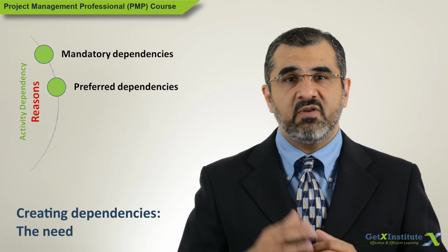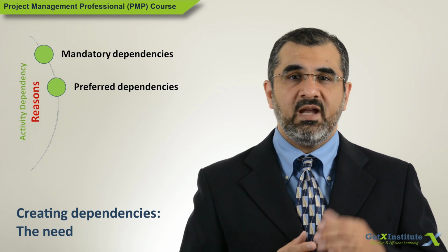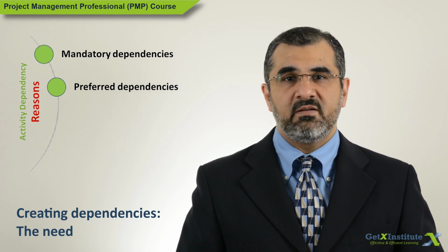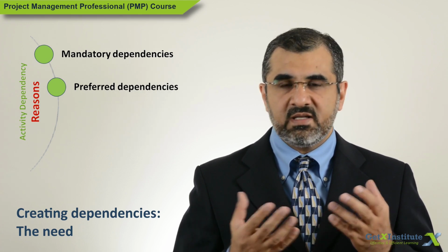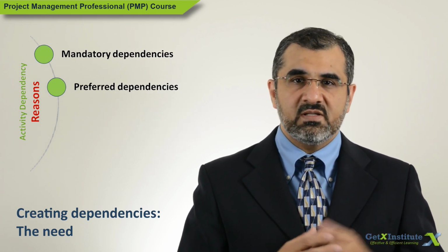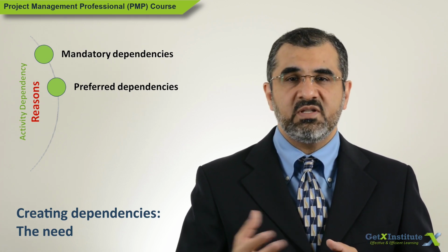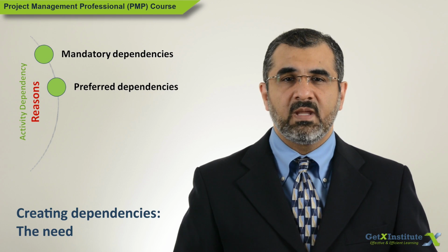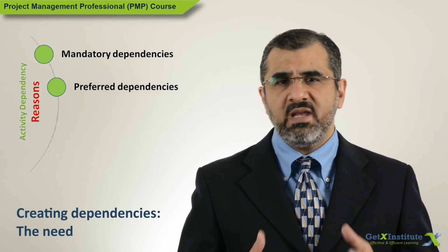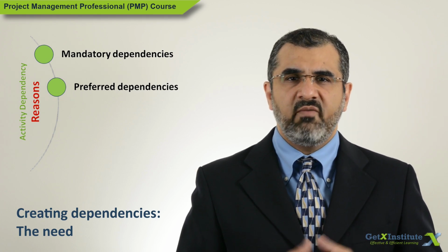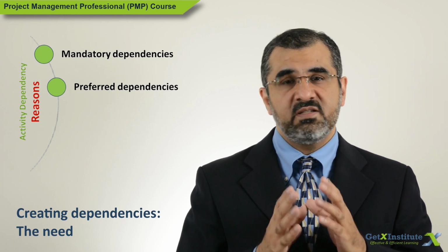It is a good practice to write notes when this type of dependency is established so that the reasoning is on the record. The project manager may also have identified assumptions for setting the sequence. So any such assumptions should be recorded in the assumptions log. Typically, these dependencies will be reviewed many times during the project. Whenever the project needs to be fast-tracked, these dependencies will be modified.